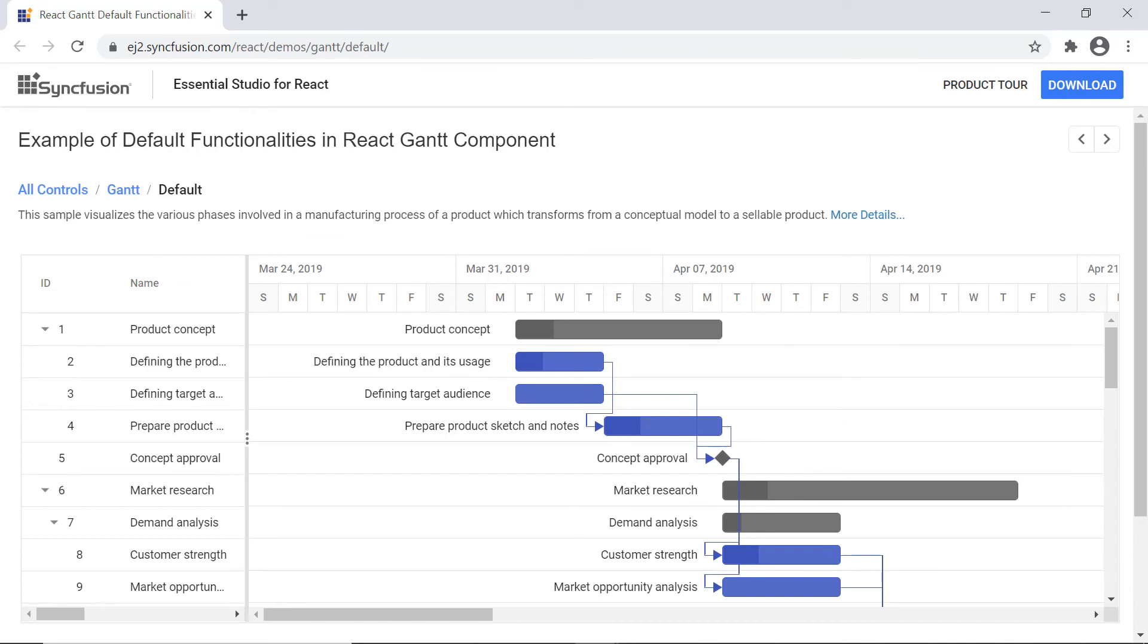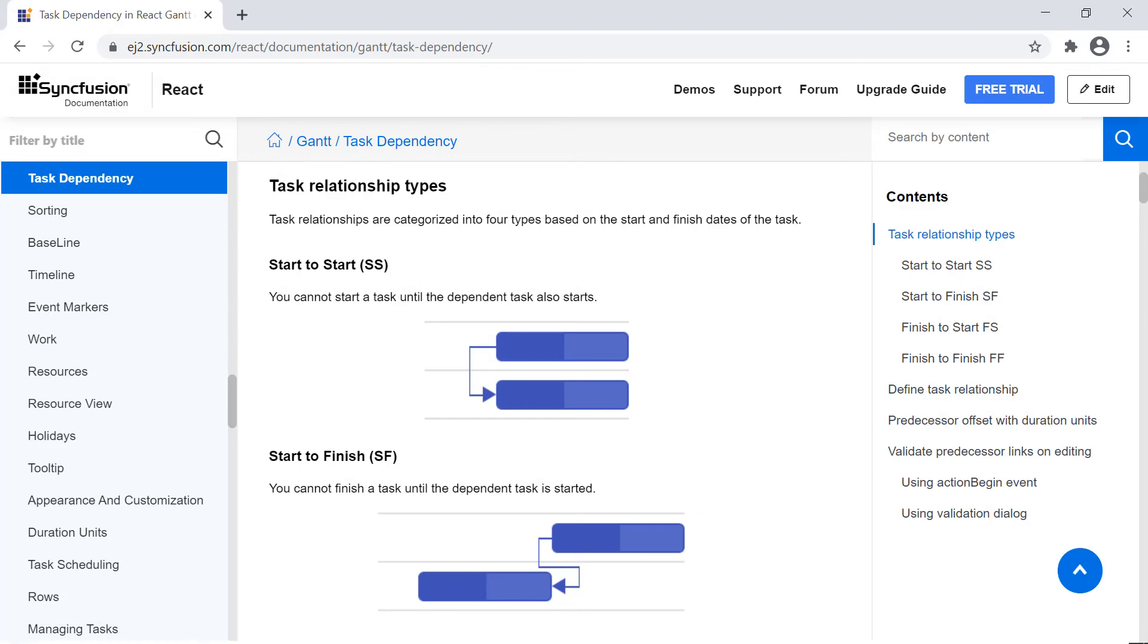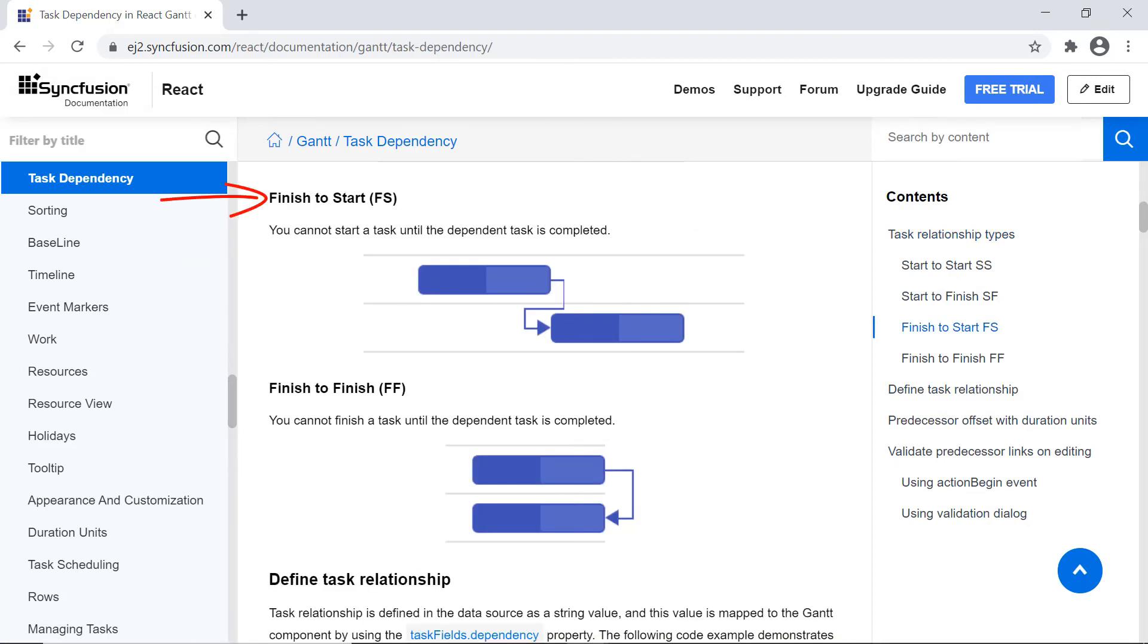Finally, I will show you how to show a task dependency in the timeline. The available four types are start to start, start to finish, finish to start, and finish to finish.